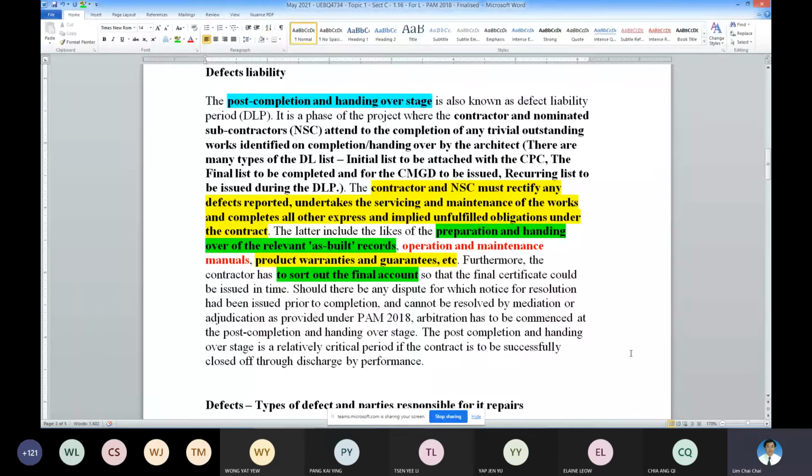Clear? Contractually, 6 months. Let's say the contractor submits at month 7 after the CPC. The consultants write back to the contractor: your additional claim is rejected, because the duration for submission of the final account has already been exceeded.